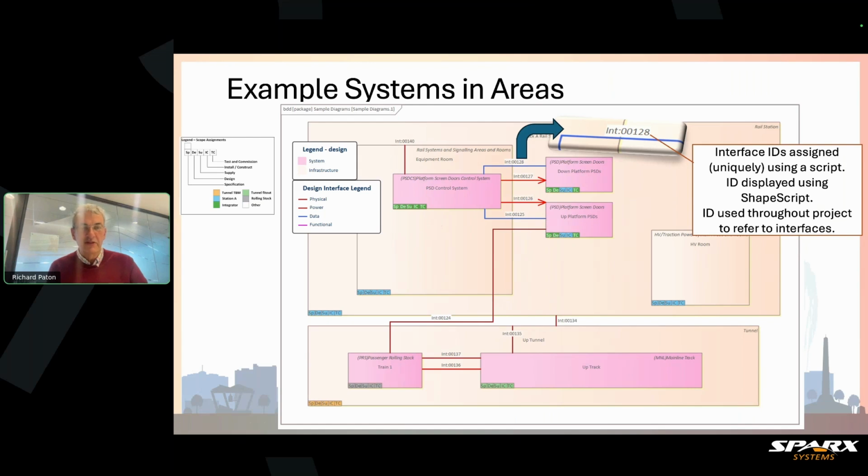The reason that is so important is because for an underground train station, space is very, very expensive, and if you get systems contractors that come in and say, well, we need 70 square meters of room, they really need to have something to back that up, because that's a lot of space. And similarly, if they underspecify, then we've got a problem, because we can't fit the equipment into the room. So that is a very important interface there.